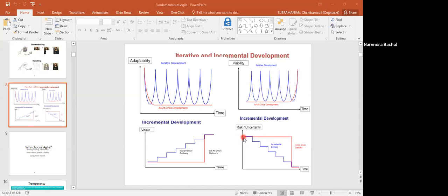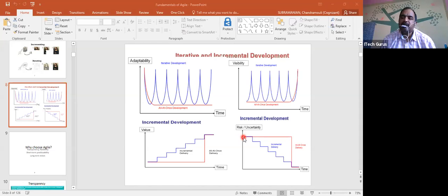It's a high risk. Please understand, all high-risk items I will do in the beginning. First we discussed value. Remember, wherever the value is high, I will do it. Now, wherever the risk is high, I will do it in the beginning. There is one more parameter: where the cost is low, I'll do it in the beginning. So there are 3 parameters I'll use to prioritize the requirement.